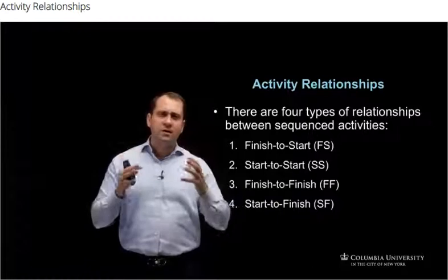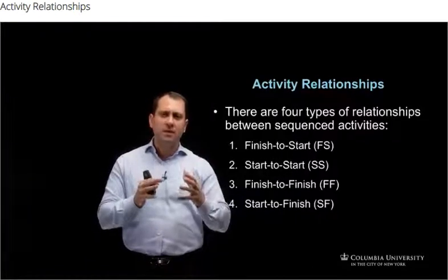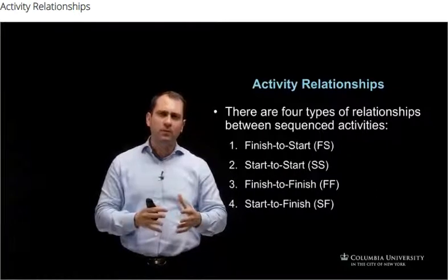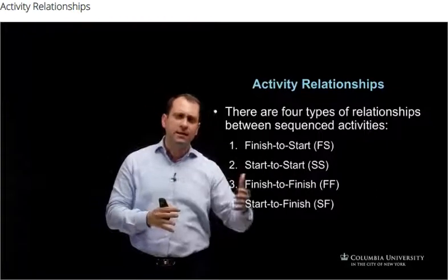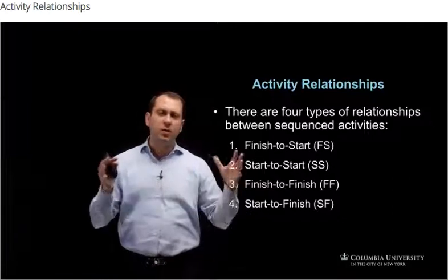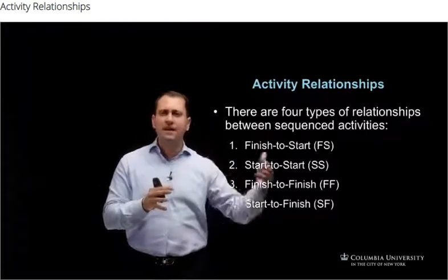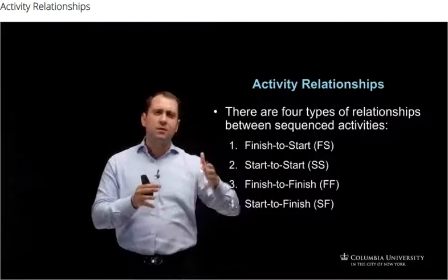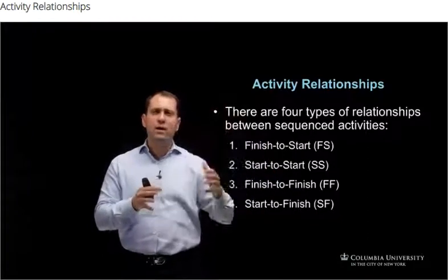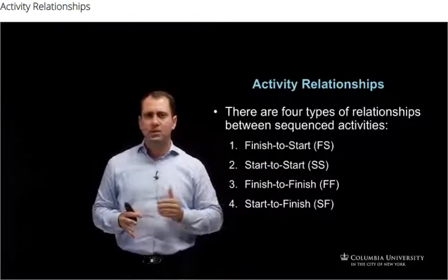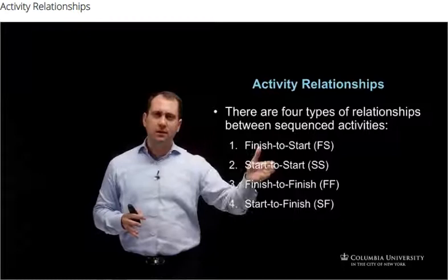I finish the construction activity of assembling the steel rebar of the column, and then the second activity, when that's done, is to put the formwork around the rebar, and then the third activity, when this is done, is pouring the concrete, once the formwork is done, and so on. So this is a finish to start relationship.